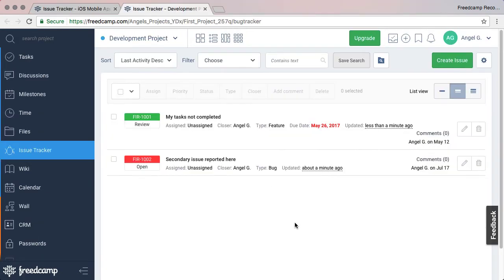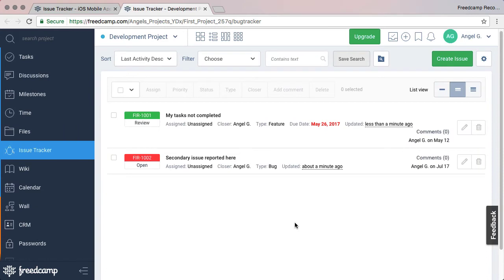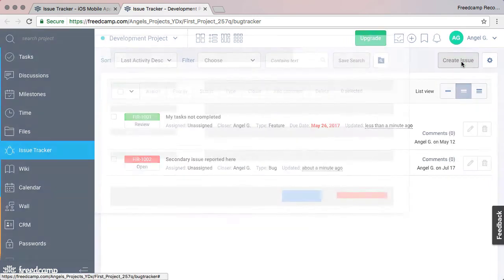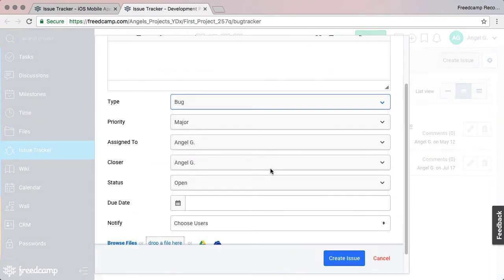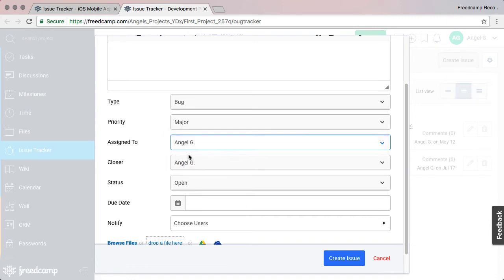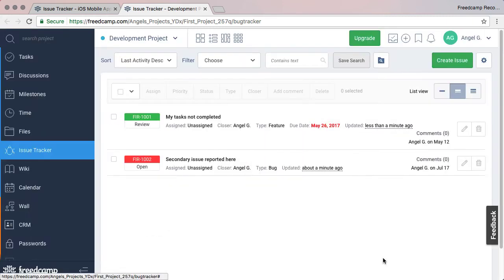The Issue Tracking application is a great way to handle more advanced use cases than the Tasks application. For example, if you would like to assign a task to an employee but prevent them from being able to complete it until a manager approves it. Once the employee is done, he simply puts it in review and the manager is notified.